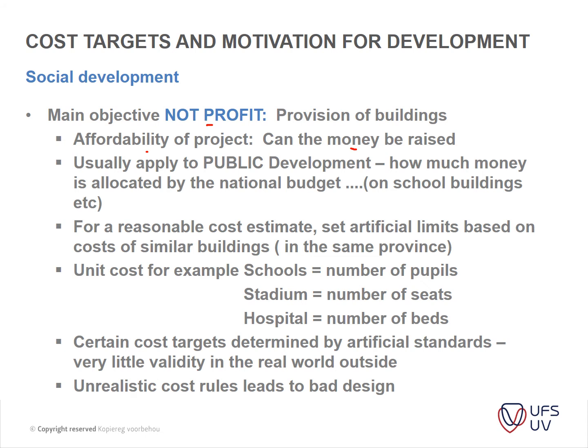Okay, so it is usually applied to public developments, such as how much money is allocated by the national budget on schools, for instance. I'll elaborate a little bit about this in a short while. For a reasonable cost estimate, set artificial limits based on the cost of similar buildings in the same province.